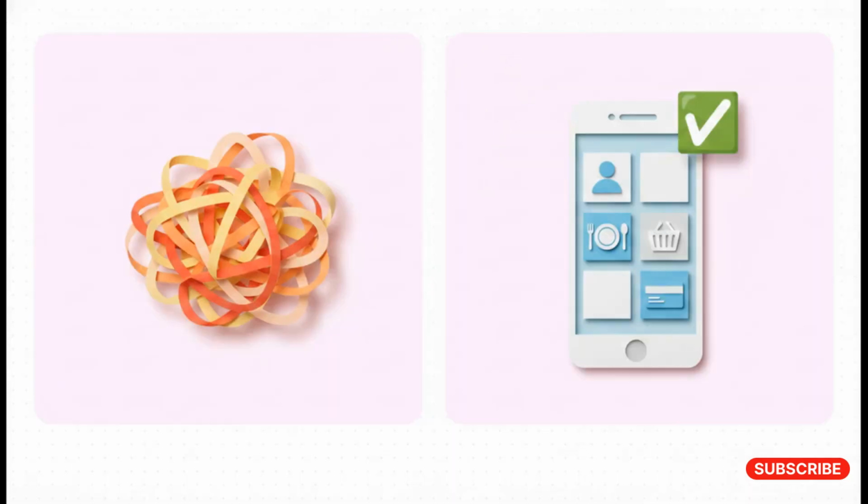And this brilliantly illustrates the difference. We have all seen a bad definition. It's like a sticky note just slapped on a monitor that says, "Make a food app." I mean, what does that even mean? Who is it for? Now compare that to a good definition, one that takes that fuzzy, vague concept and breaks it down into undeniable deliverables. Things like a user login, a restaurant listing, an order system, and online payment. By transforming a vague idea into a structured list of features, clarity literally becomes the antidote to failure. That precise definition is exactly what gets an entire team on the exact same page.